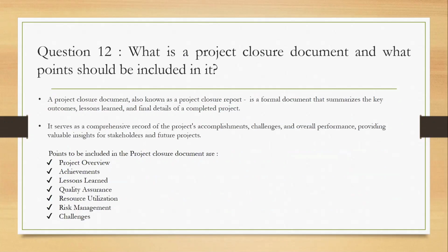And at last you will mention the project closure document. In this project closure document, you will mention a few things like project overview, achievements, lessons learned, quality assurance, resource utilization, risk management, and the challenges. Okay, so these terms are mentioned in that project closure document.